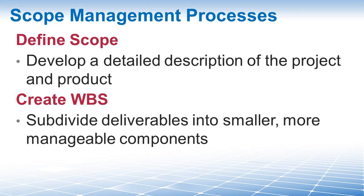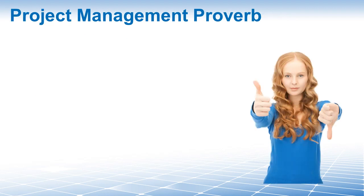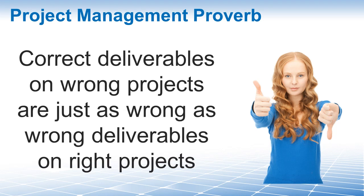Then we move on to Create WBS — the process of subdividing project deliverables and project work into smaller, more manageable components. By applying decomposition to your scope, you will break up the work into manageable pieces and document the result in the work breakdown structure, the WBS. Any project must be broken down into manageable sequences — called work packages — in order to prevent it from descending into chaos. You'll refer to the project scope statement to optimize your WBS process. And while we are talking about project deliverables, here is a project management proverb: correct deliverables on the wrong project are just as wrong as the wrong deliverables on the right project.